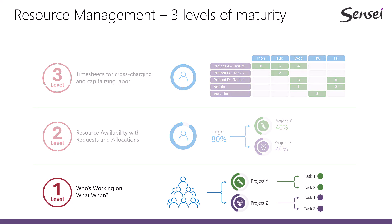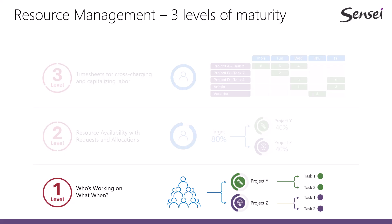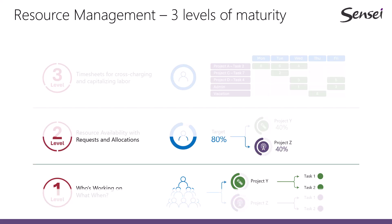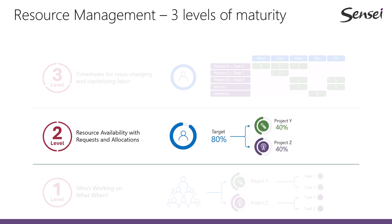Level 1 is all about visibility into the work across the organization — or, simply put, who's working on what when. These are the tasks and assignments from the various work management tools you may be using across project teams. Level 2 is resource availability through a formal process of requests and allocations. Think of this as your resource budget or your resource plan that outlines where you want people to spend their time.